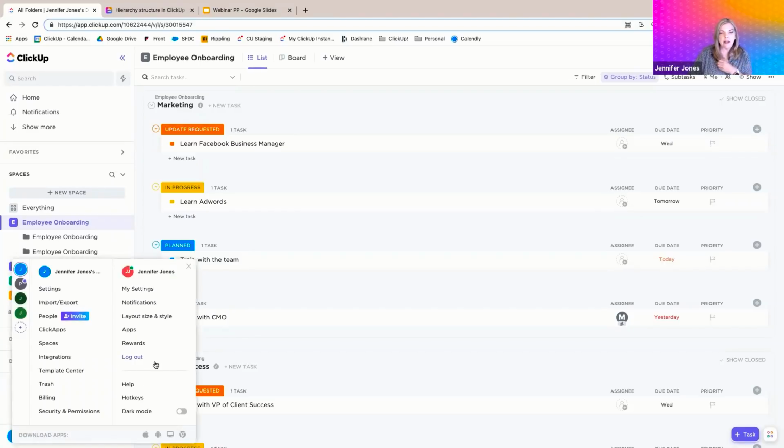The workspace is going to help you keep track of not only your tasks and your projects, but also your documents, your notes, your timelines, gosh, so much more. The workspace is the top level of the hierarchy, and inside of the workspace, you can create things like spaces, folders, lists, tasks, and subtasks. Now, keep in mind, we recommend that you have a single workspace because each workspace is completely separate. So if you have, let's say, human resources in one workspace and engineering in another, and you want to cross-share tasks, you can't do that. So it's important to keep everything in a single workspace.